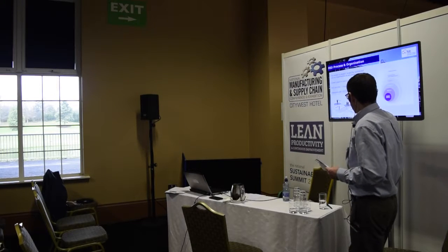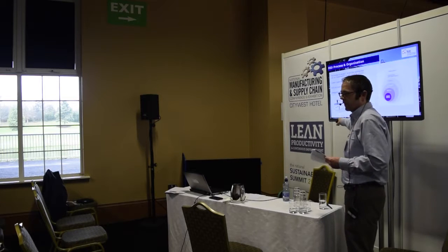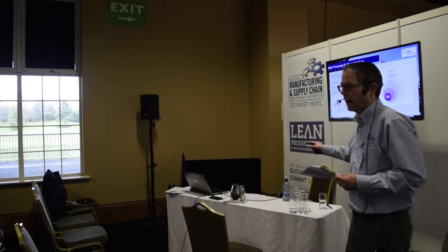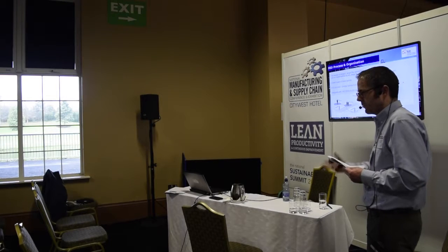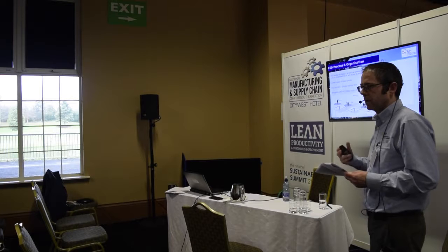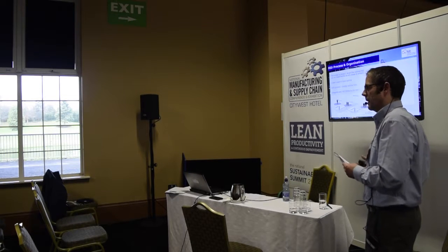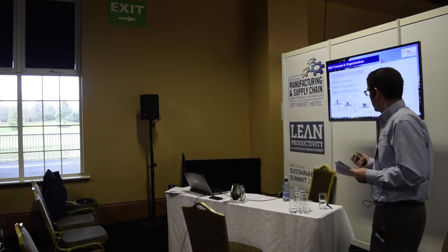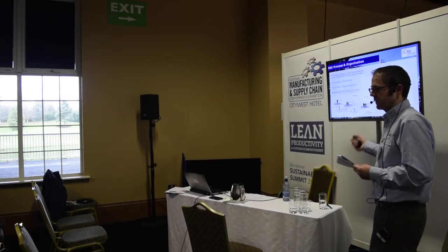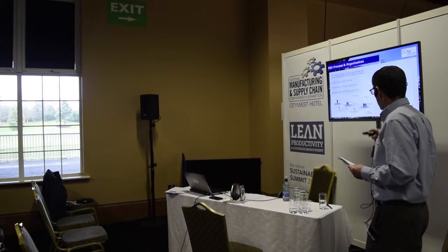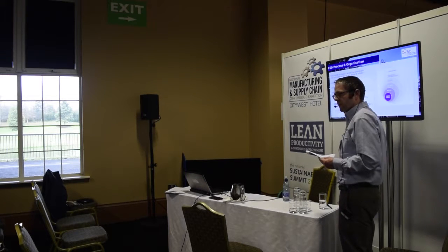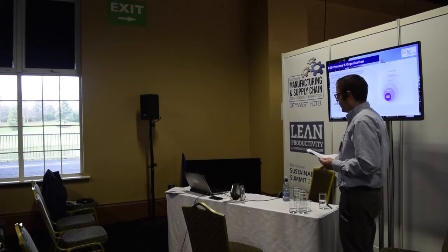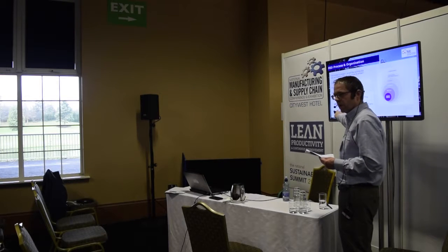Then the key roles are the EED expert, who is the person who drives the process from a technical point of view, comes up with opportunities, drives the opportunities, manages the opportunities register, manages the evaluation of opportunities, runs the EED workshops, etc. They will dialogue with the supplier's design team, they will dialogue with the project team, but they report to a person called the EED owner.